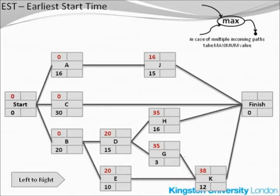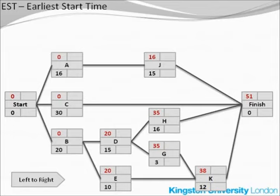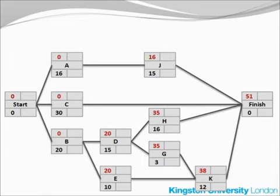A similar case we now have with the finish node — the only node left without the earliest start time. The incoming values are 30, 30, 51, and 50. The maximum value of them all is 51. Therefore 51 is the earliest start time of the finish node, and in fact it is the duration of the entire project — this is the earliest time in which the project can be finished. We have now completed the calculation of EST.